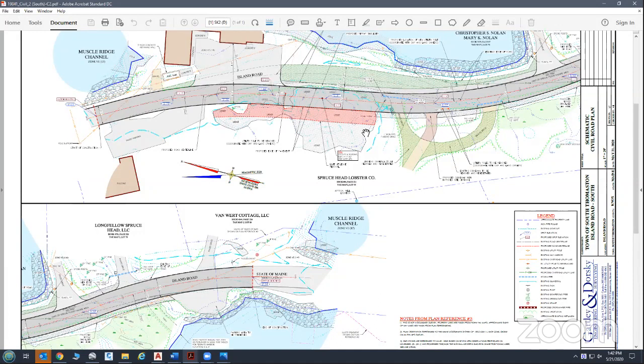The town would receive the bids. They'd be able to review all the bids, and we'd help you go through this process to make sure everything looks fine in there. We'd provide you with a recommendation on who we recommend you award the bid to, and then the town could review it and make a determination on who they want to award the bid to. Generally we see the bids being opened and reviewed, we accept them all, or at least log them all, and then the select board would review those bids, which we can attend and talk you through, and answer any questions you might have, and then you could award that to one of the contractors that you prefer.